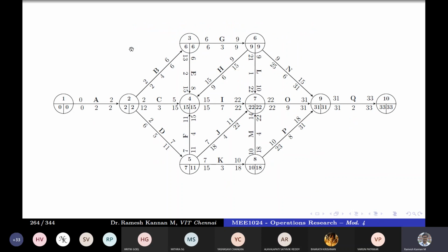And finally, if you take your exam very seriously, the answer will be this, right? So this is the network diagram, which has the earliest event time and latest event time for each particular event, and early start time, early finish time, late start time, and late finish time for all the activities. Right? So, kindly pay attention: an activity that has the same early start time and late start time, early finish time and late finish time, is called a critical activity.